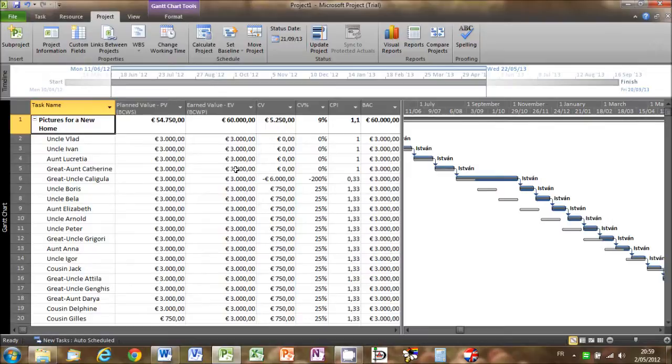The first thing that should be immediately apparent is that the cost variance percentage and the cost performance indicator are both positive. This means that our project has been completed under budget, which is a good thing. However, we should bear in mind that the rich gentleman did agree to a change in the specification of the deliverables to be produced by the project. In other words, savings were only made by the client's willingness to accept reduced versions of what was originally budgeted for.